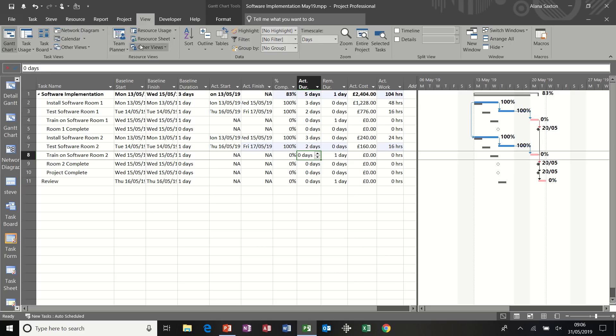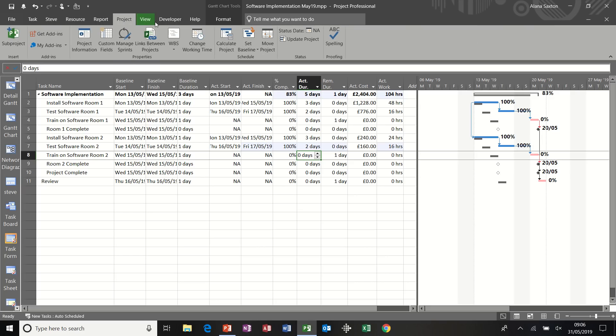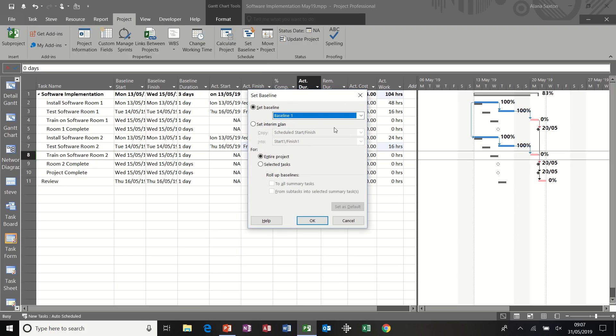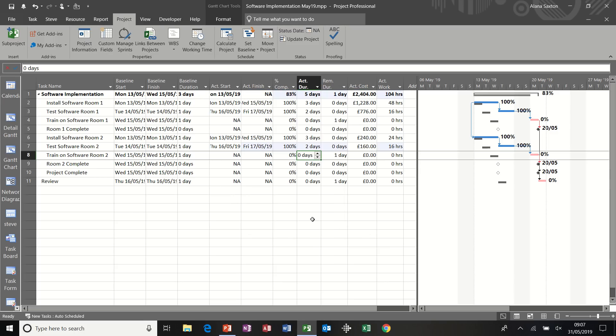Now, when we did the baseline, I told you, you can save multiple baselines. So I'm just going to save another baseline just to show you how that process works. Baseline one, the previous one was there. Click okay. So that's taken another snapshot in time.